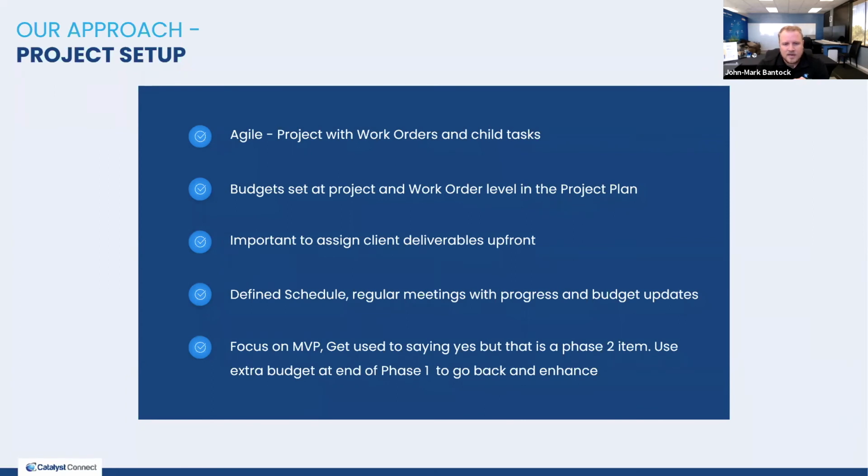And handling it that way, where we have the overall job with an overall budget where the client says, I cannot go above 25 grand. And we have 5 grand focused on the lead qualification process. We may want to then say we have a hard lock on 2,500. There's no way that we can do your minimum ask for less than this. We want to carve off an extra $2,500 of work to handle the miscellaneous pieces that come up, but we're really going to focus on this first objective.